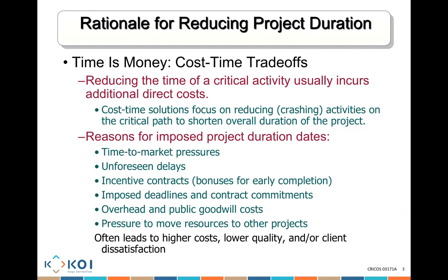Imposed deadlines and contract commitments. Someone wants to say, I want it by this date. Someone wants to tell you, you have the contract. If you don't finish it by this date, I'm going to charge you $10,000 per day.